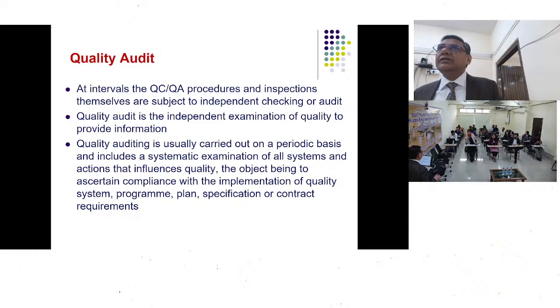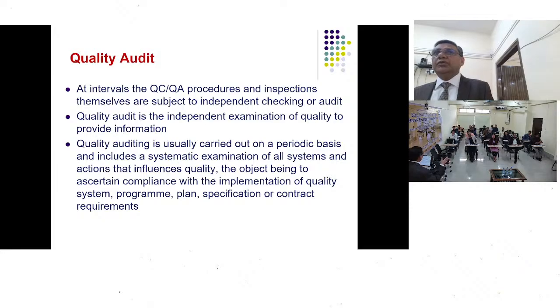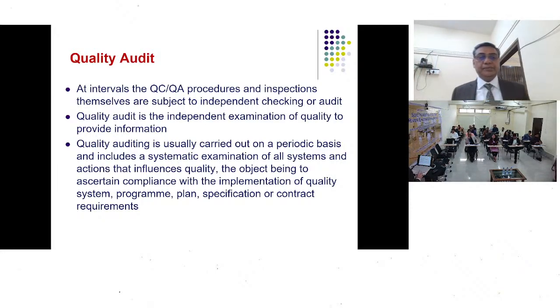So they said, sir, they are also important. We were being told that it is only the GSM which is important because that is the way the manufacturer has told us. Okay, sir, you put in the tender as 200 GSM, I'll provide you a 300 GSM material. So therein I am trying to tell you, the quality audit people will be telling you, okay, these are not the only parameters which you have to look into. You have to look into some more parameters also.